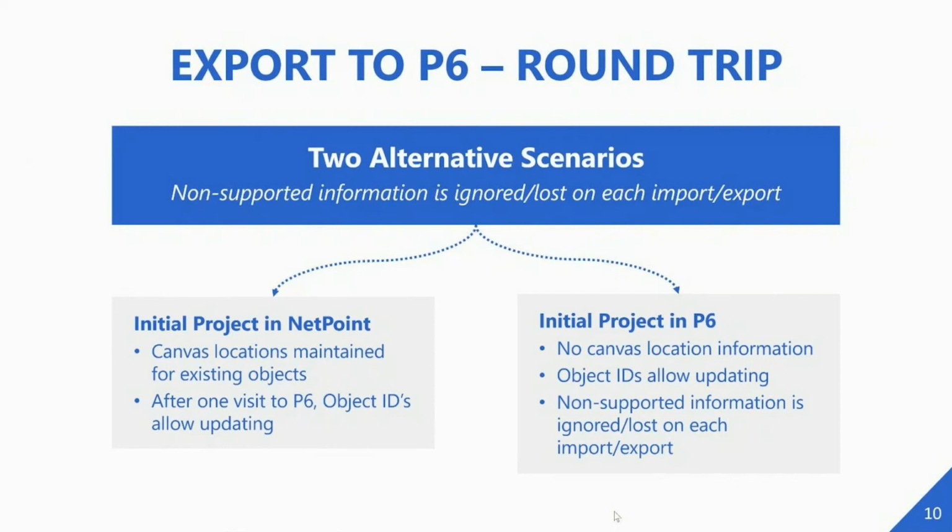Once you have that XER file imported into your P6 database, whenever the project exports, it exports with that location information, which allows you to bring it into NetPoint with all the layout information already there, thus not requiring you to use autograph or any manual layout of the project.